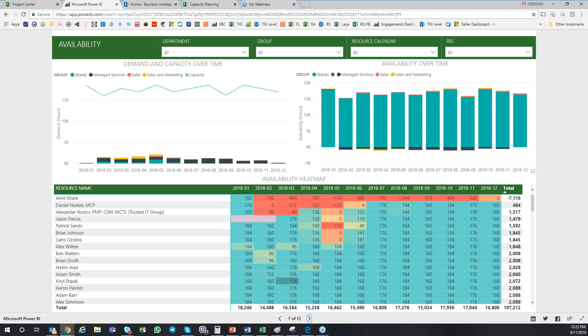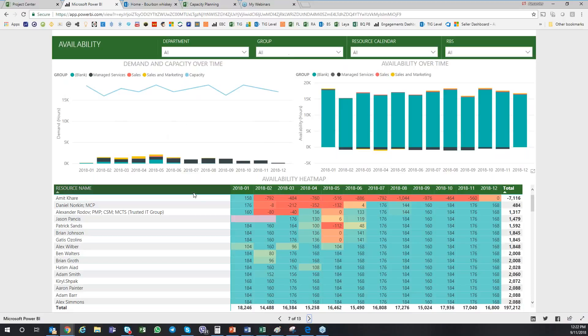The red negative numbers would show you those cases where the resources are over-allocated, and this is where you need to kind of improve the resource balancing, giving you all the insight about that. The upper left corner here is showing you the overall capacity of the organization on a monthly basis, and those towers at the bottom are showing the actual availability.